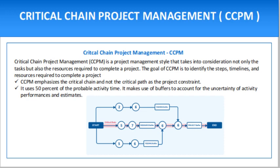Critical Chain Project Management is a project management style that takes into consideration not only the tasks but also the resources required to complete a project. The goal of CCPM is to identify the steps, timelines, and resources required to complete a project, giving you a roadmap to ensure you complete more jobs on time and on budget. CCPM is similar to the critical path method in that it strives to identify the critical set of tasks and timelines needed, however CCPM takes it one step further by also considering resources — people, equipment, physical space, and materials.